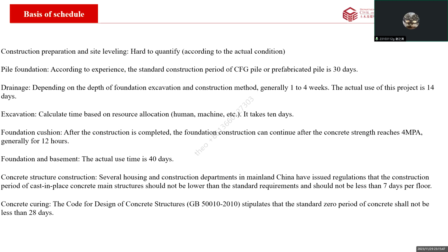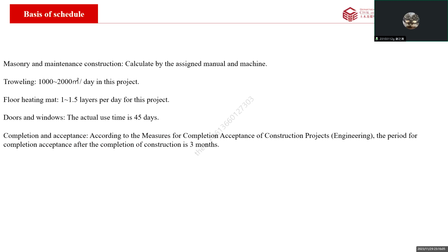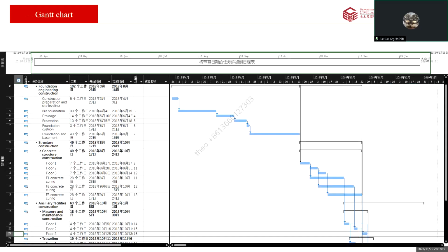You can see that some are based on the CAD drawings and the given data, and some are based on the national regulations and the relevant engineering experiences from the internet, and also the calculation from the budget. Then I continued to find information through those ways to get the sequences of each unit and arrange them, and also find the necessary pre-tasks of each unit and whether they can be done at the same time.